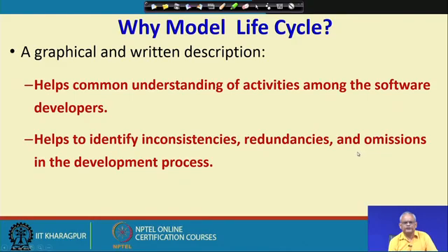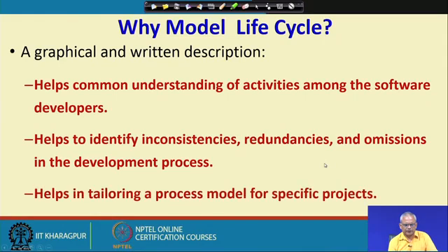Let us say review is not mentioned, but that is really required. So, we have to mention review in the life cycle model. And not only that, as long as we have a written life cycle model for a specific project, we can look at it and tailor it a little bit, noting that these are the activities which are not required, or these are some new activities that will be required for this specific project.